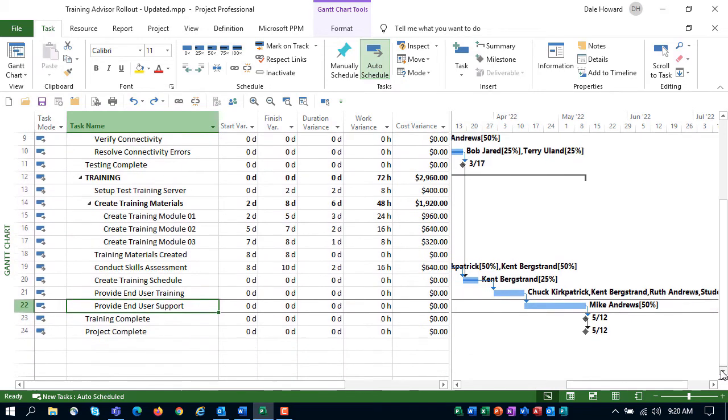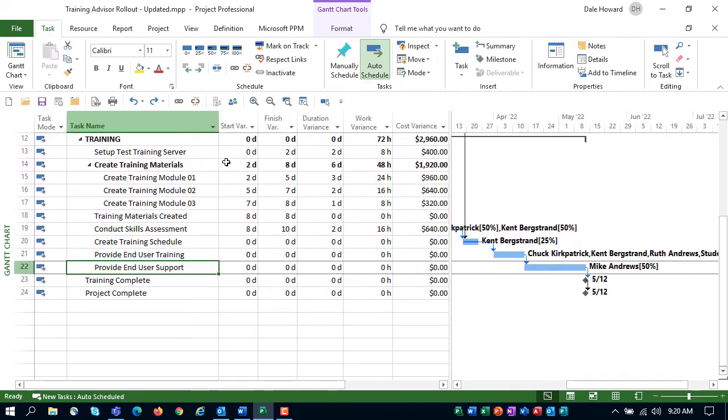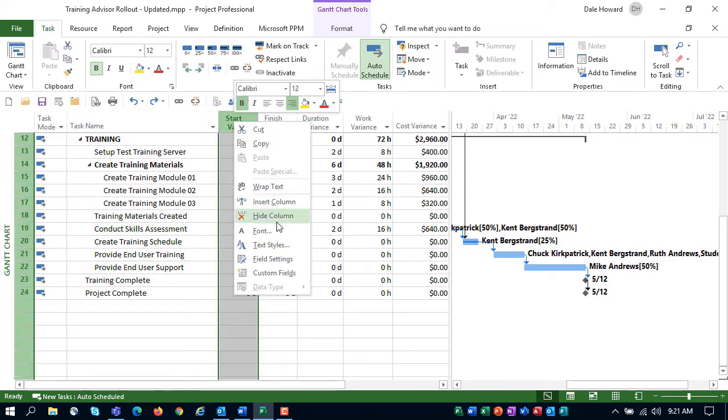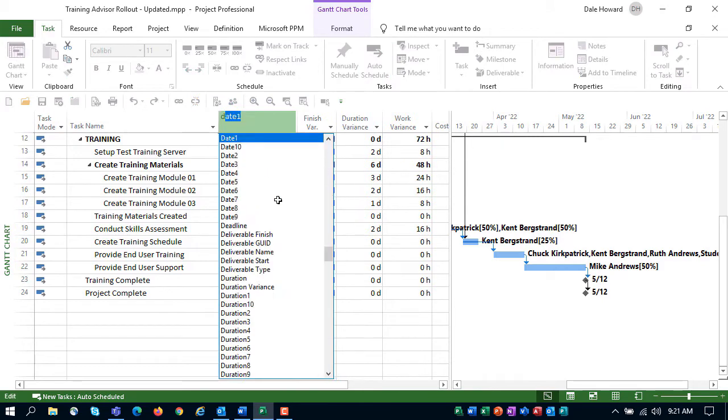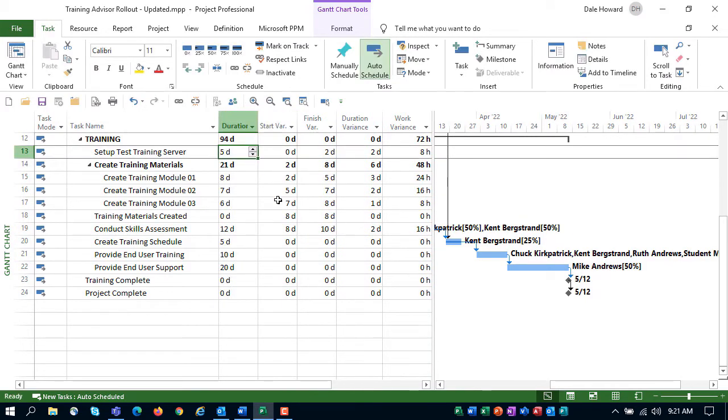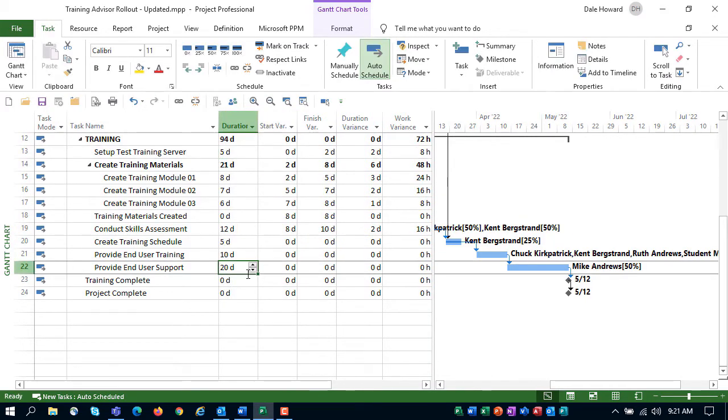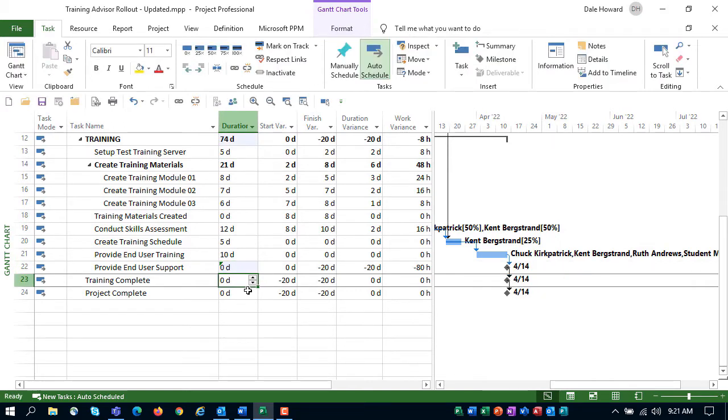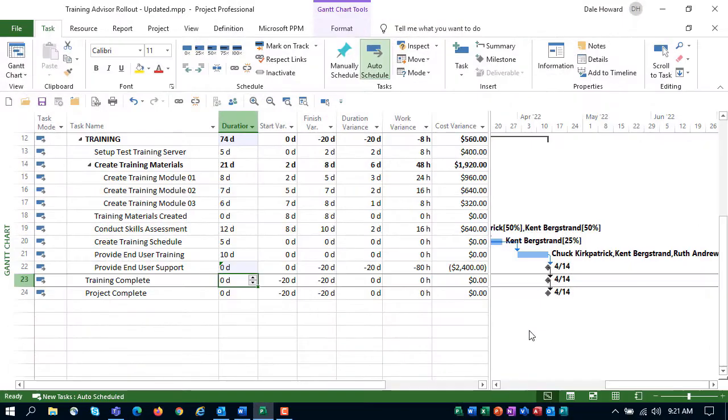If you have the standard version of Microsoft Project, you need to use a process to cancel a task. Now, this process involves first setting the duration to 0 days. So let me go ahead and insert the duration column here temporarily. So what you have to do is initially set the duration to 0 days for the canceled task. Now, what that will do, it'll cancel all of the work, all of the cost. You can see the task is effectively canceled.